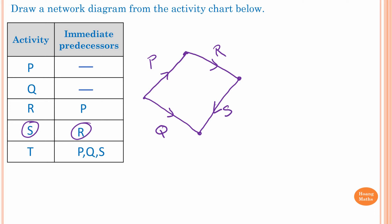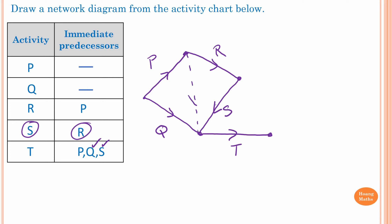This is Activity S. For T, we draw Activity T here. T has predecessors S and Q, but we also need to connect P. Remember, you cannot draw a solid line — if you draw a solid line, that represents an actual activity, and there is no activity between T and P. So we need a Dummy Activity here, connected with a dotted line to show it is a Dummy Activity.